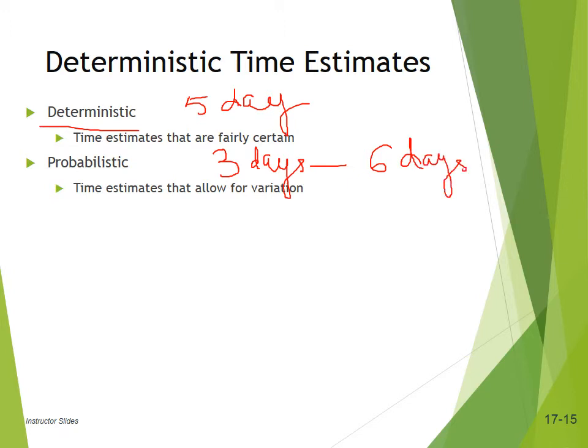That is the time duration of that activity. So this is probabilistic because we don't know for certain how much it is exactly. We can give a limitation of the time duration of that activity, the mean time and the max time, and we can also associate or give it a probability of that happening.